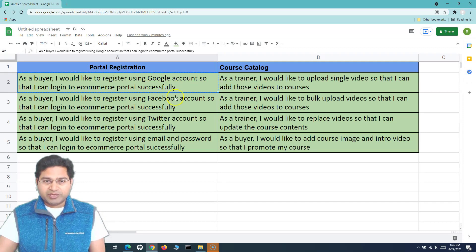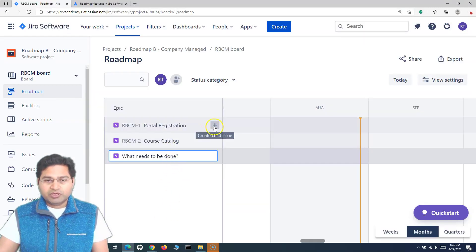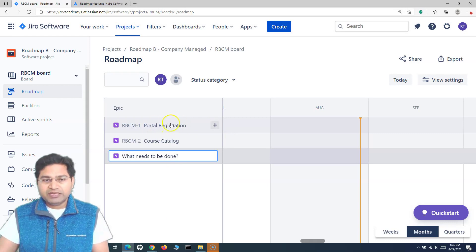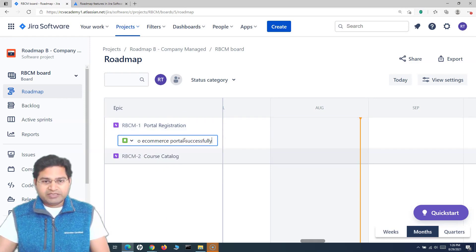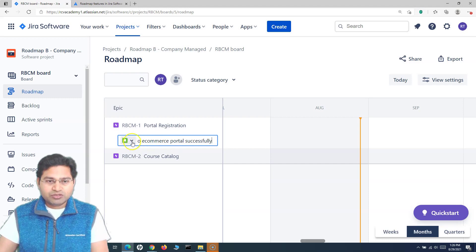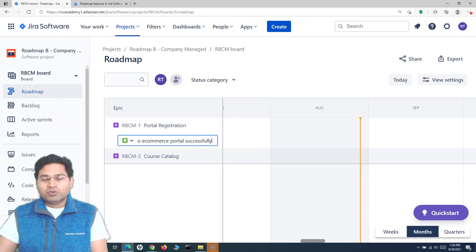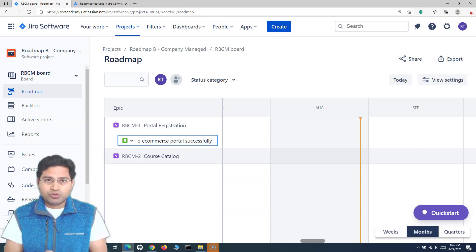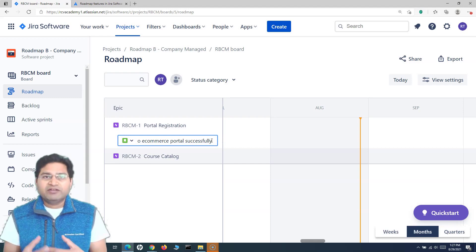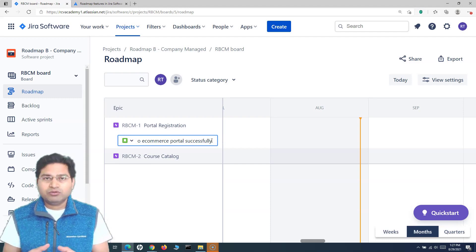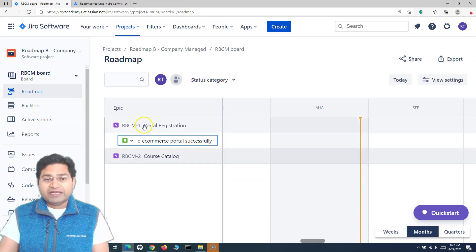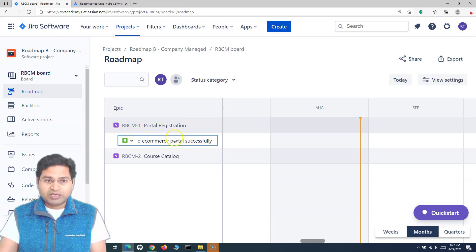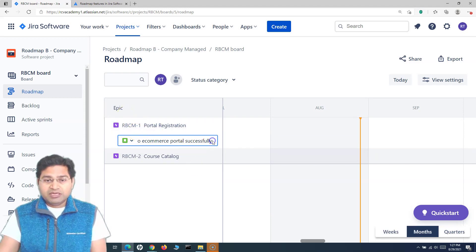To create a child issue, hover over the epic and you'll see a plus icon — click that and paste the story. By default it will be a Story type, but you can change it to Task or Bug as well. When starting roadmap planning, you'll have epics and stories. As stories are built by the development team, the testing team finds defects, links them back to the epic, and those defects become visible on the roadmap too.